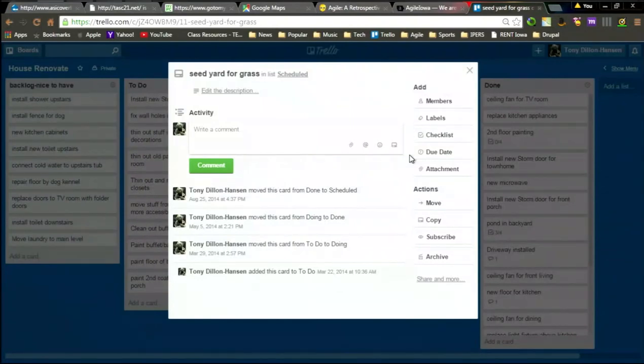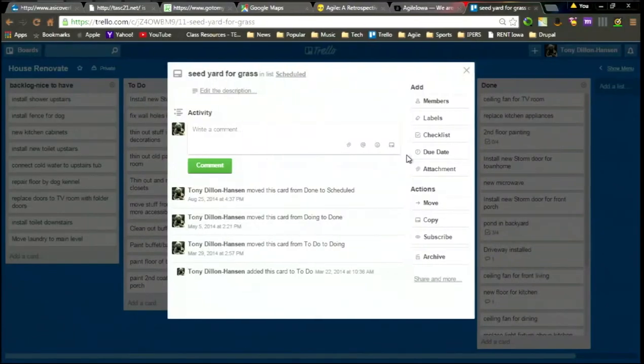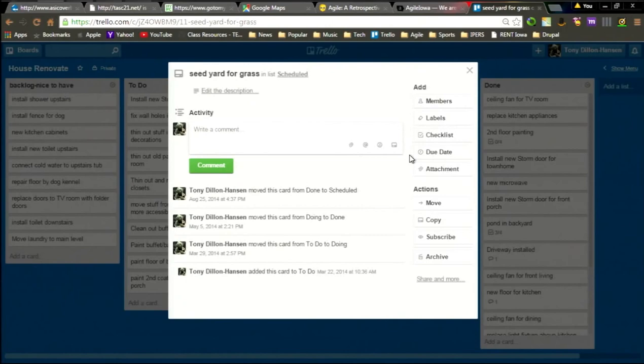It should be small tasks. The smaller you get them, the more deliverables you have. The larger they are, the more scope creep has a chance to come in, and as well you get deliverables that are ill-defined.